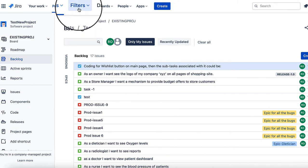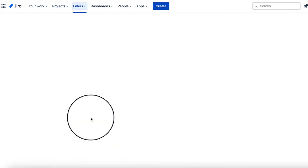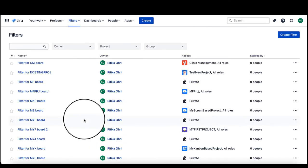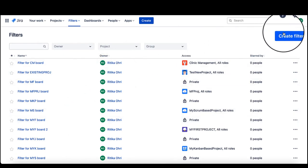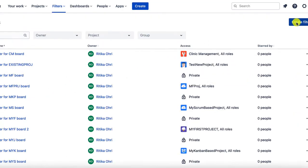I am into my project TES new project and I will be creating a filter for this project. On the top menu, we can find filters. Click on view all filters. If you want to create a filter, on the right hand side, we can see a create filter button. Just click on it.